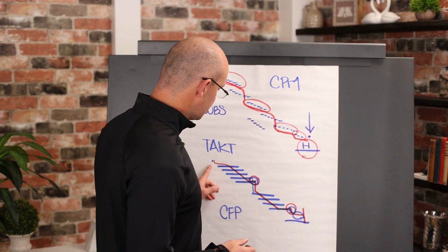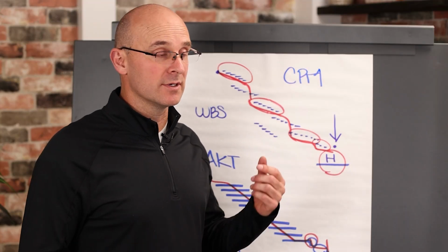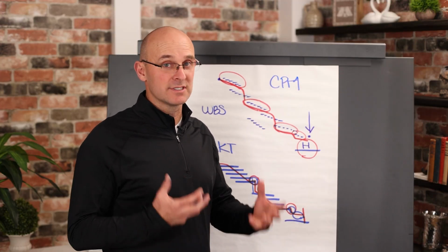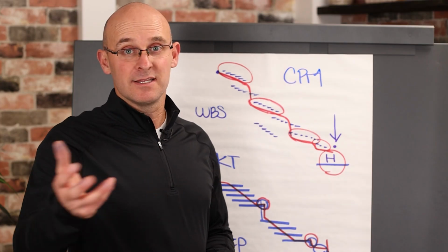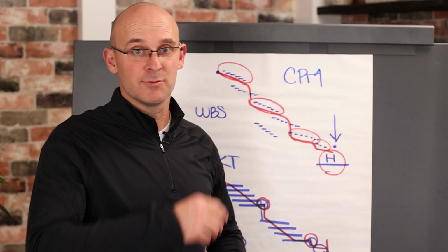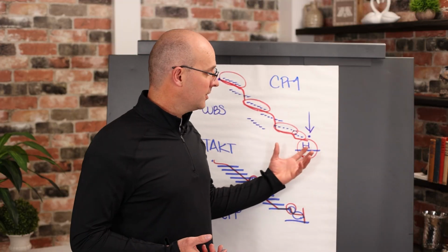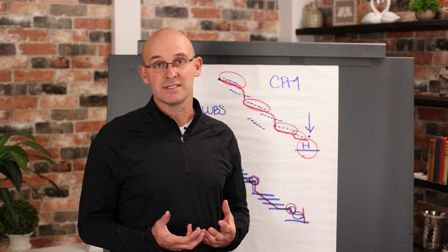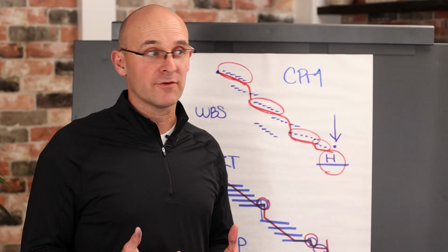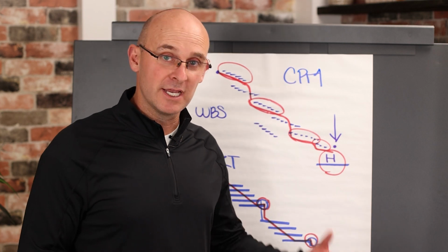Meaning, if there was a problem that happened in the sequence, if there was a worker shortage, if there was, I'm not talking about a safety accident, but some kind of accident, let's say the crane was being shipped to the project site and one of the sections hit a bridge. That actually happened to me. And now you're delayed for a couple of days. You're going to want to use that float and those buffers for things like that. It's not a free-for-all for, hey, I didn't finish design, so now I'm going to eat up all your float. So be careful of that.